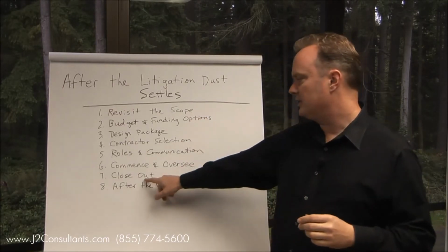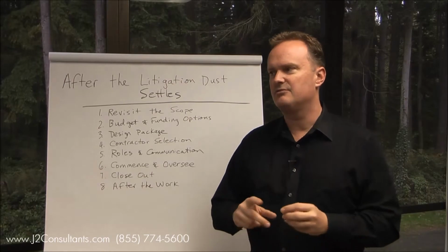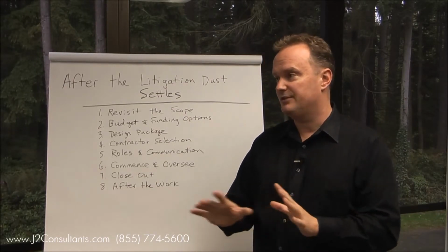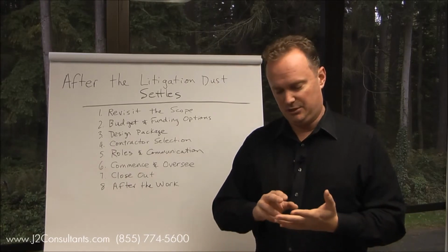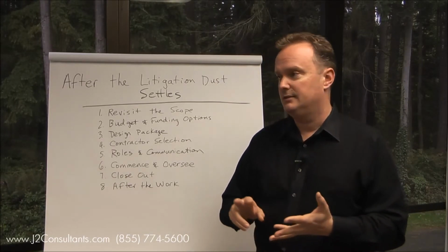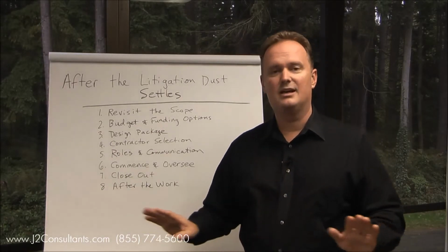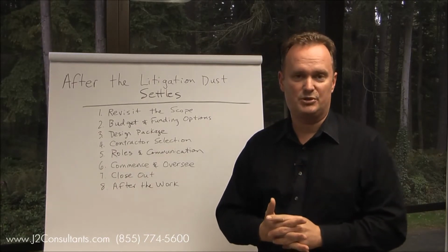So anyway, on to closeout. Closeout is a term for wrapping up the end of the job. Make sure you get the lien releases. Make sure all the subcontractors are paid. Make sure the warranties are in place. Just make sure that everything gets buttoned up and done the way it's supposed to be.